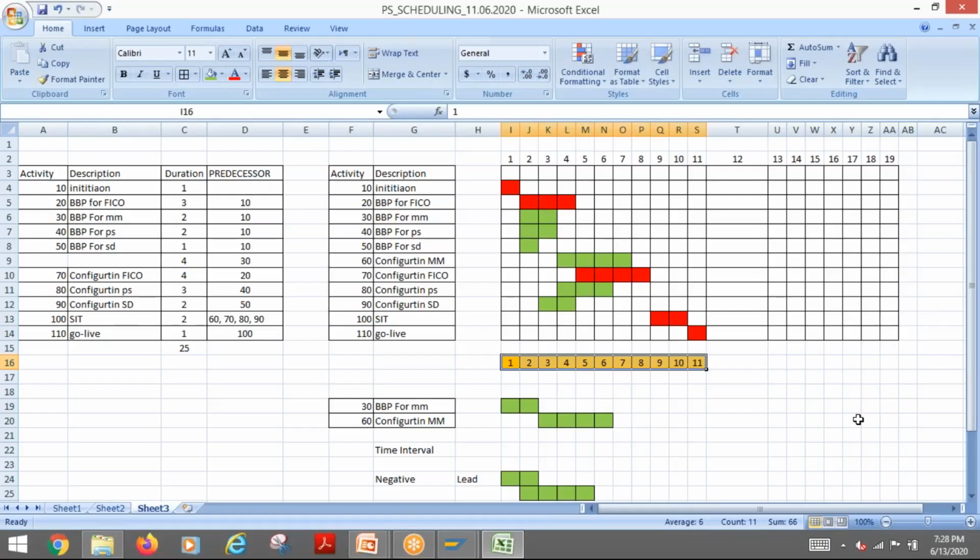Sometimes you send only the duration, because normally it sends duration and relationships, and then you can do the scheduling in the system. Or there is an option to send it as a constraint, which means no relationship is required. That way is also possible.